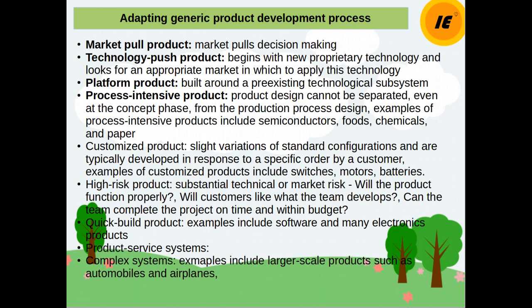The generic product development process is modified in high risk situations by taking steps to address the largest risks in the early stages of product development. These usually require completing some design and test activity earlier in the process.